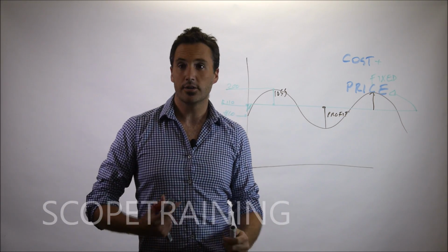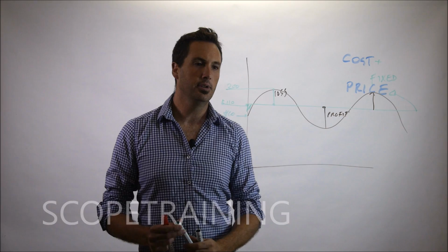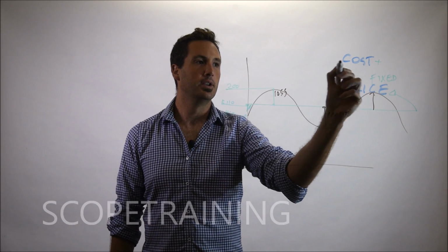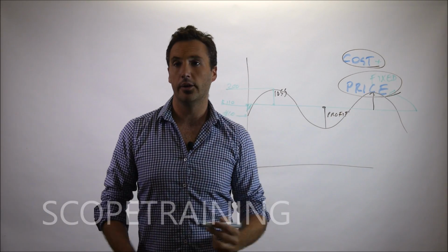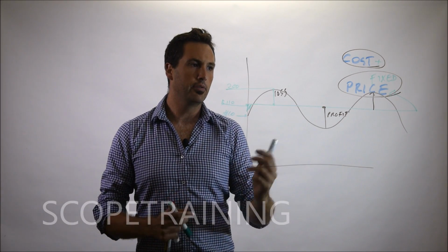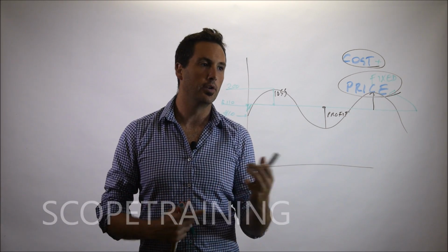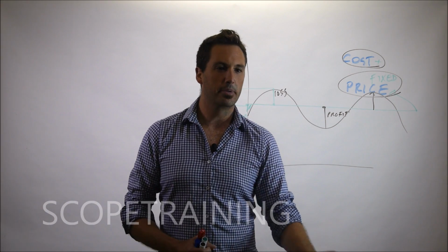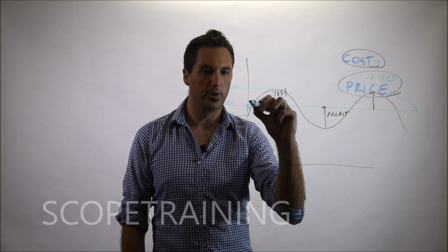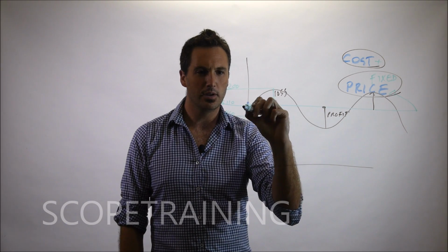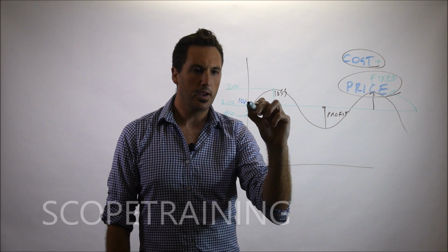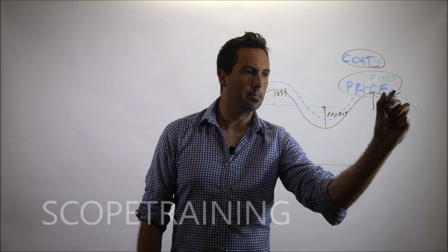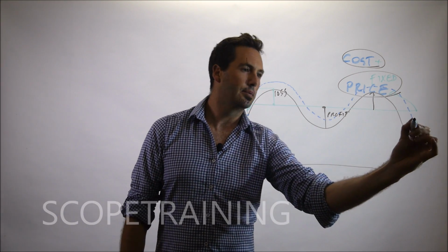Now, when we look at how we actually charge people, especially from a contracts point of view, there's lots, but there's two main types of contracts from a cost perspective. There's a cost plus and there's a fixed price or lump sum contract. Both of these contracts tend to try and offset risk from one to the other. So, with a cost plus contract, basically our price is a function of the cost. So, we come up with a margin, and let's say 10%, and what it costs us, we add on that markup, which then becomes our margin. And the price becomes a function of that.